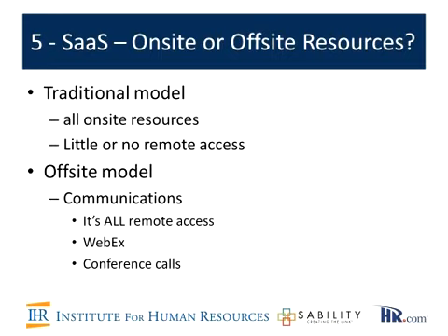Yeah, I think that's a key point, and you were kind of alluding to it, but most of the implementations we're doing these days, especially in the mid-market, our consultants are running 2 to 4 implementations simultaneously, for a couple of reasons. For the reasons that James mentioned, as well as you guys typically have payrolls to run and things like that. So it helps to interleave because you may not have the capacity to be a dedicated resource to the implementation all the time. So interleaving 2 to 4 projects gives you the breaks to do your job while the implementation goes on.